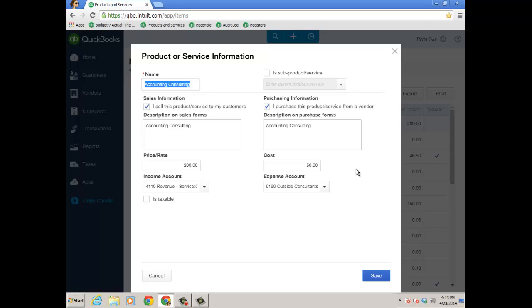And you put in your description, et cetera, and your appropriate cost of goods sold account, your revenue account over here. Okay, because the item on the estimate is going to be linked to this account, and that's where I'm going to put in the cost. I'm going to budget that versus the actual that I have on my cost transactions. And likewise, this item for revenue is hitting this particular income account. So when I invoice it, it's going to hit that account, credit that appropriately, and that's going to change the numbers in my budget to actual report.